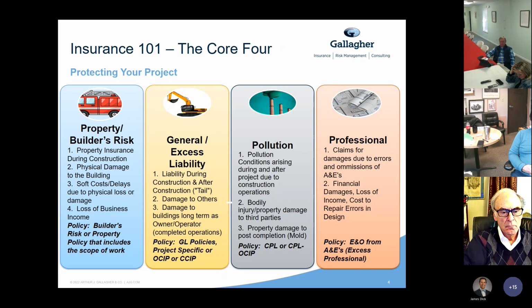And the last example I'll give is sometimes within construction projects, especially with brand new construction, a lot of soil gets moved around, and with the soil erosion and runoff, there have been incidents where it'll contaminate a local creek or a local river during the development of buildings, and claims can be made saying that the contractor violated the Clean Water Act and state water statutes, and that can lead to a mess. And that is something that would be covered under a pollution policy that would not be covered under a general liability policy.